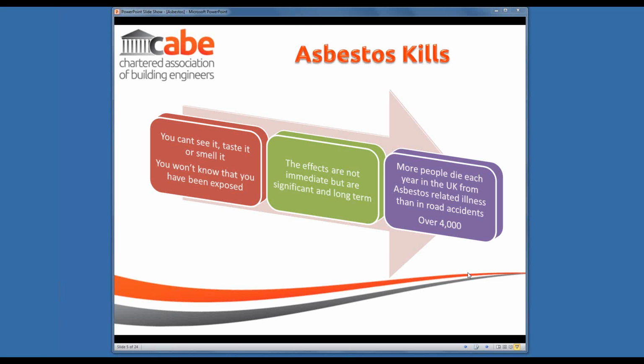Realistically, what you have to say to yourself is if you're working on a building that was built before the year 2000, there is a fairly high likelihood that it will include some asbestos within the building.